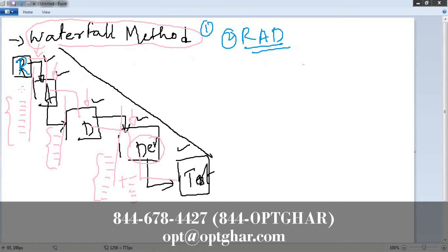After initiating, it goes through requirements, right? So suppose there are 100 requirements. Just an example, okay? 100 requirements are there. Now requirement analysis has to be done, right? Suppose 50 of the requirements have completed the analysis. Okay, so you know what they will do? While they are working on the rest of the 50, these 50 they give to the design team.